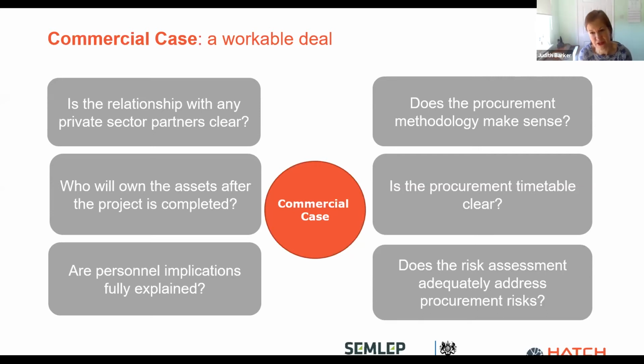If anybody wants to look at it, you'll be very welcome to take some of the details from it. It certainly is worth making sure that you have considered the issues of subsidy control, because it isn't just possible for the public sector to give the private sector significant funds. It is important that you have gone through a full and competitive procurement process to be able to demonstrate that you have provided best value and that you aren't actually subsidising a contractor.